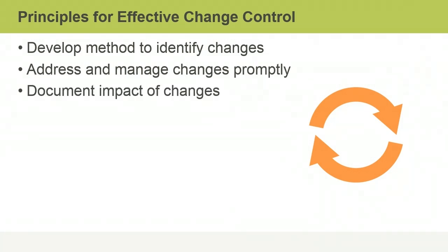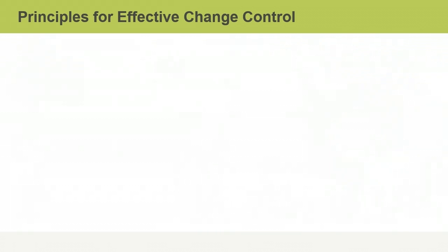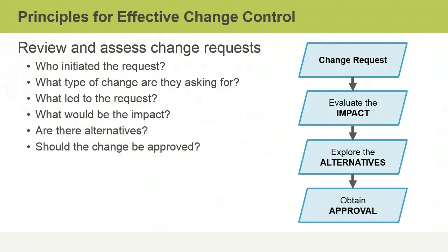You should also document the impact of changes. Project managers need to track and document the impact of all changes in an issues log or change control log. This helps improve your own change management skills and develops resources for others in similar projects. The project team should always review and assess change requests before making a decision to reject or approve them.